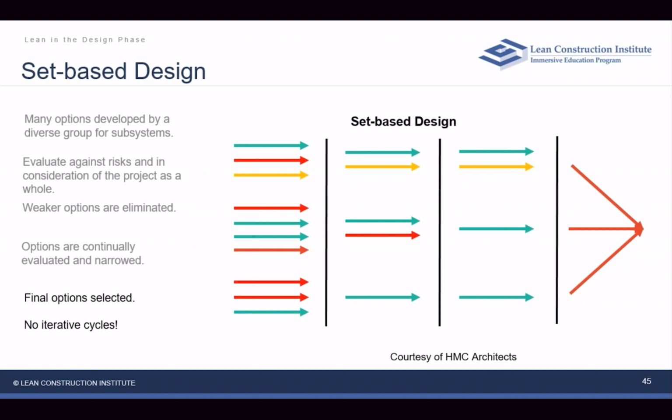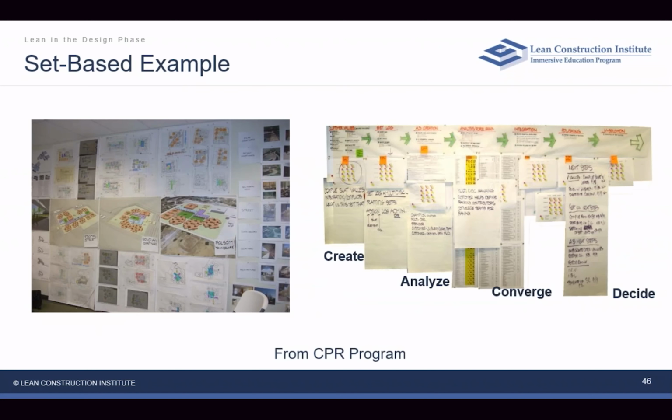So set-based design is not exactly telling you how to decide which ones go forward, but it's this framework of how we move our ideas and narrow down. And again, there's no rework cycle, so we don't have that waste going on, and we're holding back the design to that last responsible moment, so we're not getting too far ahead of ourselves.